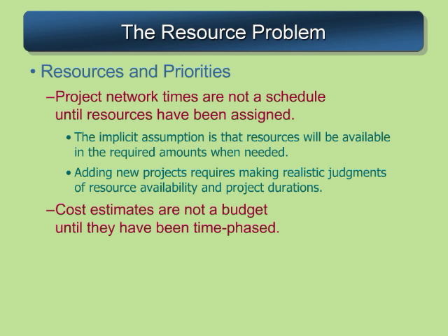And of course, when we put projects into our system, then for sure we start losing the availability of those same resources as they're being desired to be used over multiple projects. Furthermore, you really don't know what your budget's going to look like until you've aligned your estimates in your work breakdown structure to the costs associated with that work. And that way you have a time phased budget plan, so you know when you're going to need the necessary resource called money to get your project going.